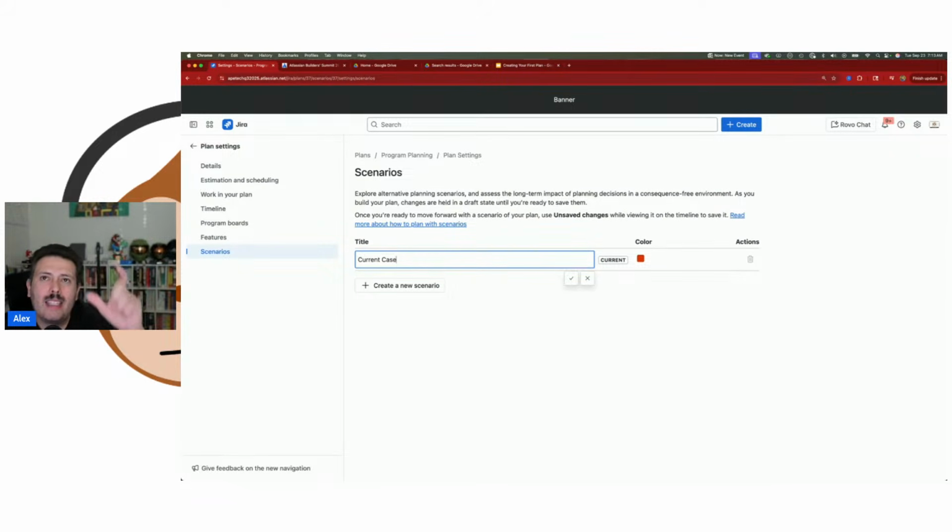You want to identify that the current plan, the one that you've been working off of for weeks, months, years, decades, that is the plan, right? Or you can call it main plan or something like that. You just want to indicate that whatever you have in there today, that is the plan, okay? Because you're not going to alter the main plan. We want to continue to execute with the main plan until something serves as a catalyst, something that triggers us to have to alter our plan. We don't want to mess with the main plan. So you should leave main plan.